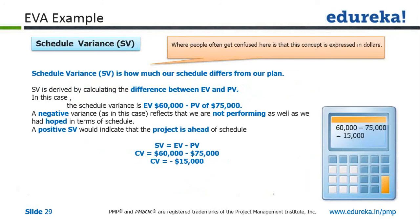We also calculate our schedule variance — how much schedule difference we have from our plan with respect to the dollar value of work. The formula for schedule variance is earned value minus planned value. Our earned value is $60,000 and the planned value in two weeks' time — which is 25% of the total duration — was $75,000. So the schedule variance is $60,000 minus $75,000, which gives a negative value of $15,000. Any negative value is not good news — it tells you that you are behind schedule by work worth $15,000.